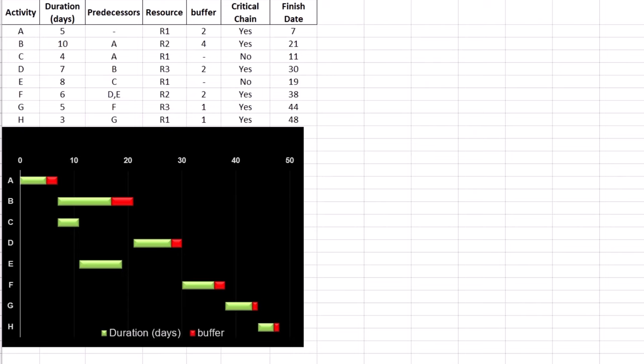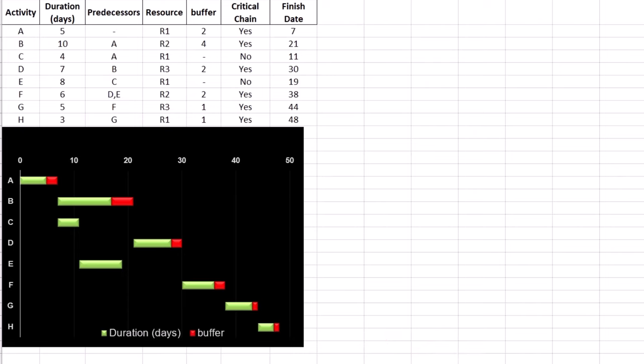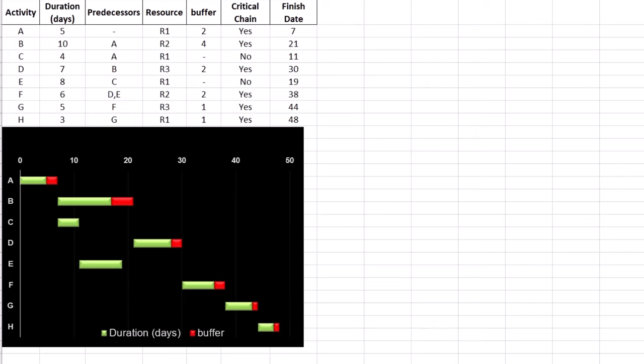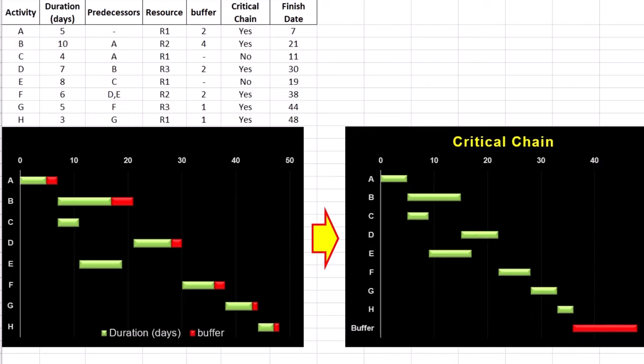Our aim is to gain more efficiency using critical chain project management or CCPM. Eliyahu Goldratt developed that based on the theory of constraints or TOC. To manage project bottlenecks, arbitrary scheduled paddings are integrated into a single project buffer to prevent activities from taking longer than necessary, which is known as Parkinson's law. In our project, the second Gantt chart animates these concepts and replaces scheduled paddings with a single project buffer of 12 days.